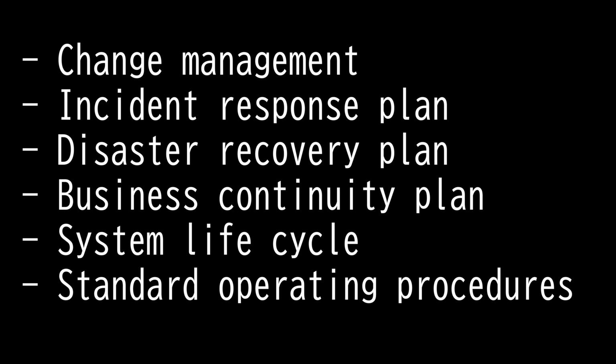Approval can be done by a single admin or formal committee based on size of your organization and the scope of the change being approved. After the change has been approved, the next question is to address when it is to take place. Authorized downtime should be used to make changes to production environments. There should also be notification of change getting pushed out. Those affected by a change should be notified before, during, and after. Notification should include any and all impacts and identify whom they can turn to if there are any questions.